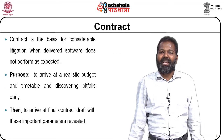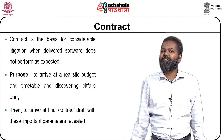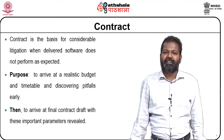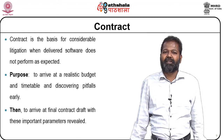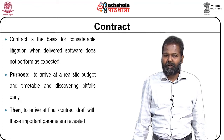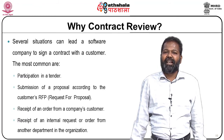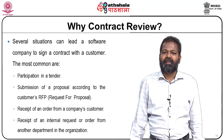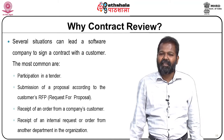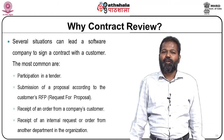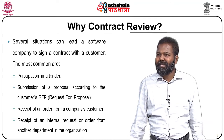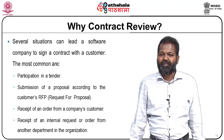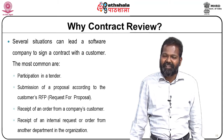A contract is the basis for considerable litigation when delivered software does not perform as expected. The purpose of contract review is to arrive at a realistic budget and timetable and to discover pitfalls early, then to arrive at a final contract draft with these important parameters revealed. Several situations can lead a software company to sign a contract with a customer. The most common are participation in a tender, submission of a proposal according to the customer's request for proposal, receipt of an order from a customer, or receipt of an internal request from another department in the organization.